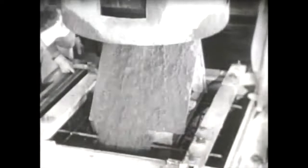Savings in labor costs were a result of the shorter construction period, the even distribution of forces, repetitive nature of work, and the excellent cooperation between labor and management to prevent work stoppages. This saving amounted to $196 million. And more important than the saving is the significant contribution made by the plant in the production of uranium-235 for military use in defense of our way of life and for the peaceful application in the arts of humanity and progress.